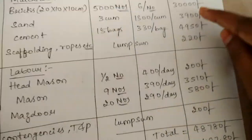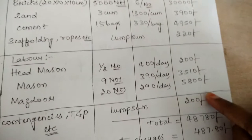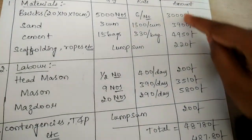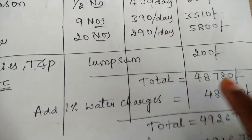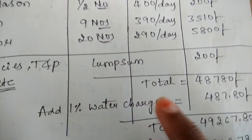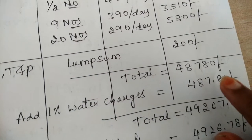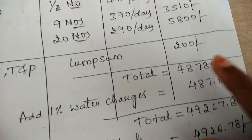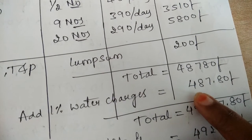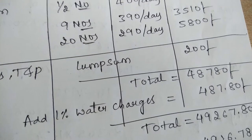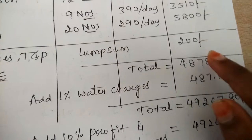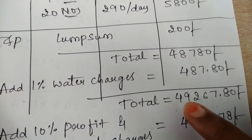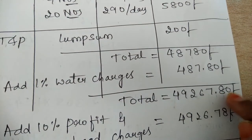After finding all the amounts, we add all the amounts at the end. On adding all these values, you get a total amount of 48,780 rupees. After getting the total amount, we add 1 percent water charges. One percent of this amount gives 487 rupees 80 paise. On adding these two amounts, you get a new total of 49,267 rupees 80 paise.